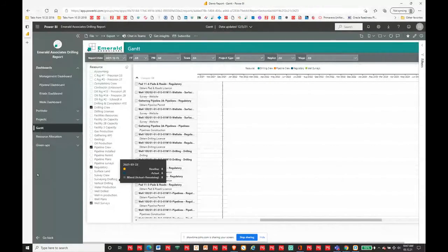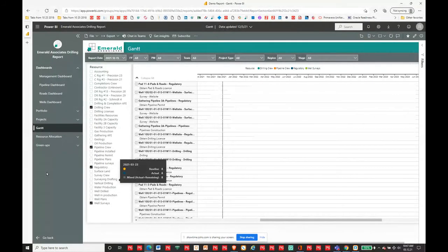Something to keep in mind for those of you that may not have been aware is that in some of the latest versions of P6, Oracle added some great features. The role coding and resource assignment coding allow you even more flexibility on some of this. I think they started that in version 20, and of course, anything in the cloud over 2021 will have those additional codings.